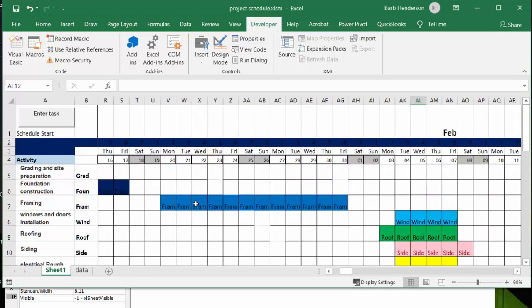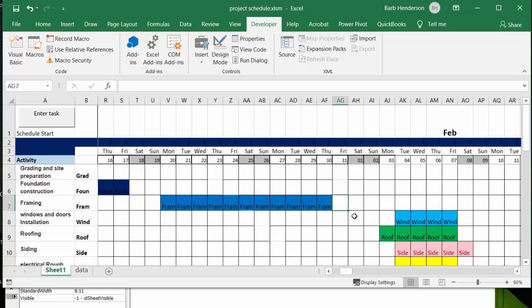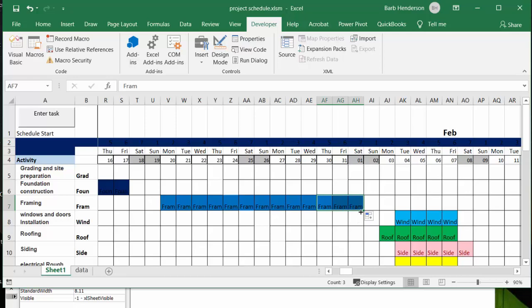Now if the framers decided that they were going to be done before, then it's just a matter of simply deleting it, or if you wanted to extend the framers longer you could click on the bottom and drag them off, give them another couple of days in your schedule. It's as easy as that.